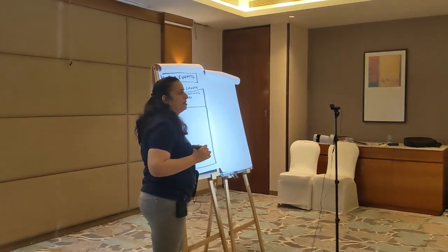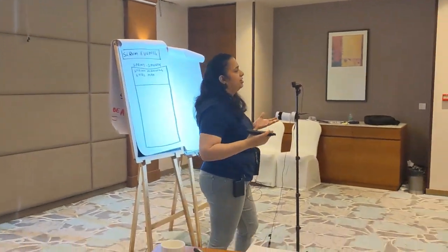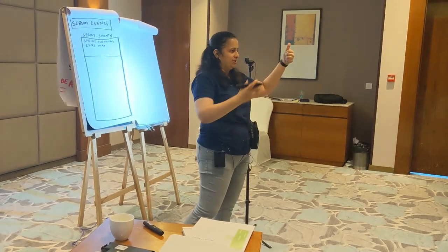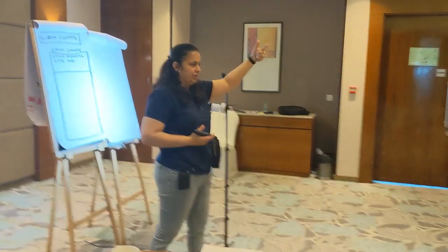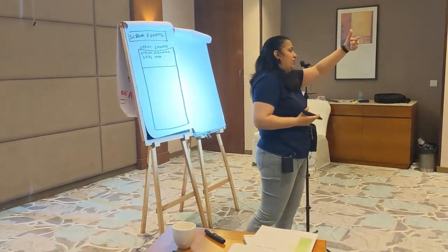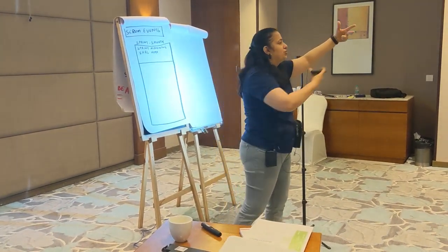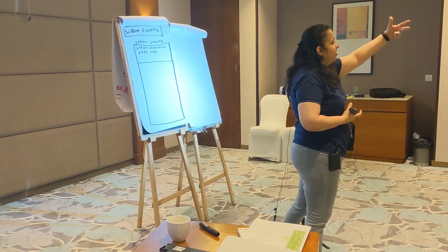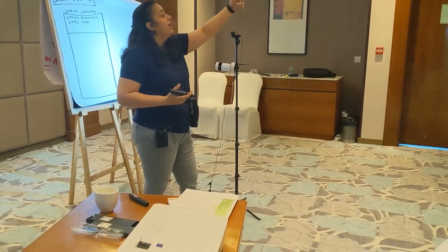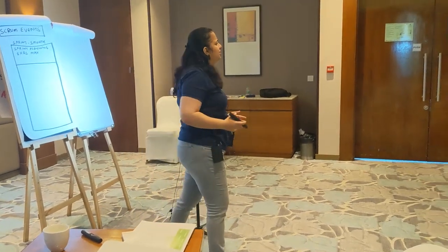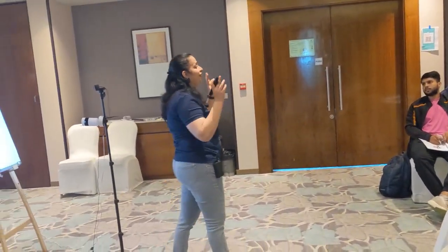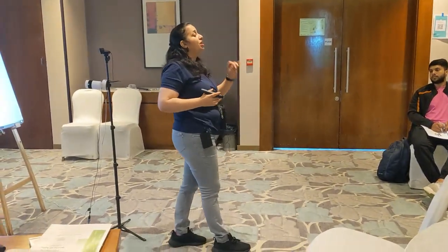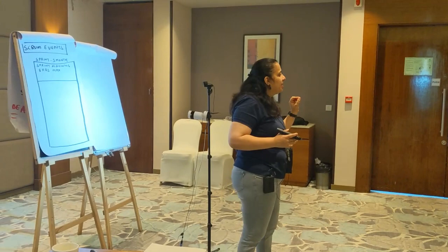Now to plan our sprint, we definitely should have the developers because they are the ones. How about product owner? Yes. We need the product owner because that's the person who can tell you what is the most important. Do we need the person who helps us work together as a team, the Scrum Master? Yes. So Scrum team definitely. Along with that, should we have any other external parties? Stakeholders. I heard somebody saying a very nice word right now. If required. Others only by invitation or if required. Don't make it a free for all.